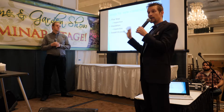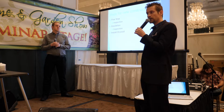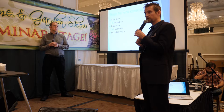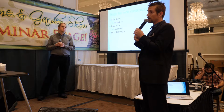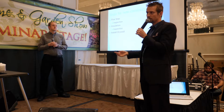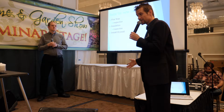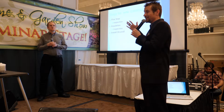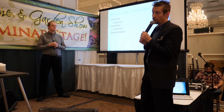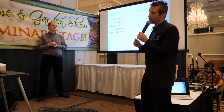If you're working in any village or the city of Chicago, I'll speak specifically to Chicago first. We didn't mention it in the architect phase, but if you're doing a house in the city of Chicago, we want to make sure that they're self-certified. This is a certification that the city gives certain architects that they trust and who have done so many jobs. This allows them to get permits, in some cases, in 2 to 3 weeks, that might take another architect 6 months or more to get. So it's super important in the city of Chicago to make sure they're self-certified and that they're working with an expediter.